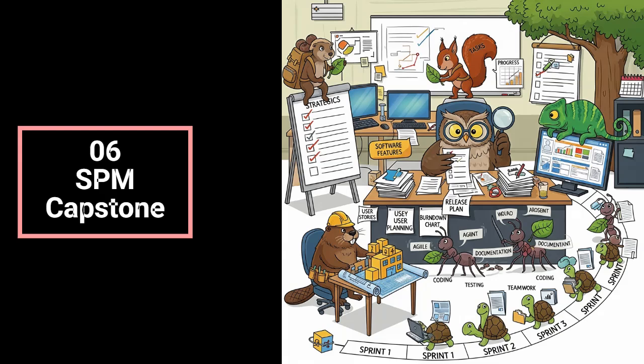Week 4 also has assignment 4.3, writing acceptance criteria and tests. Yes. Defining done. So, for each user story, you spell out exactly what conditions must be met for it to be considered complete and working correctly, right? Exactly. Specific, measurable criteria, often framed as tests you can actually run. And there's a lesson specifically on acceptance tests.